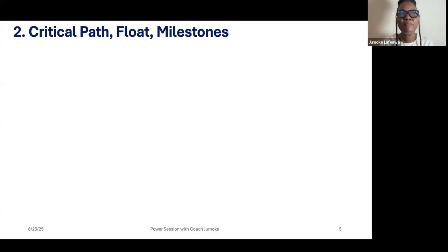So you don't determine that, okay, for this project, I'm going to have only 3 paths, or only 2 paths. Sorry, my tongue doesn't allow me to pronounce it well. Paths. So you don't say, okay, this project is going to have 5. No, it is when you are sequencing the activities in the logical manner that the number of paths comes up.